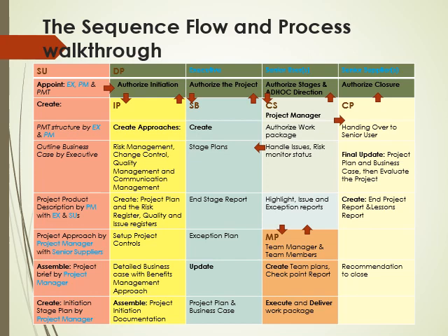Once the stage is authorized, it means that the project manager can now go into the controlling stage process. Remember, all the activities of the project board is done in directing the project process. That's why it is running across the other processes. Okay? So in controlling the stage, the project manager is giving work packages to the team managers. They are functioning in managing product delivery. These two processes work together during the stages, the controlling the stage and the managing product delivery.